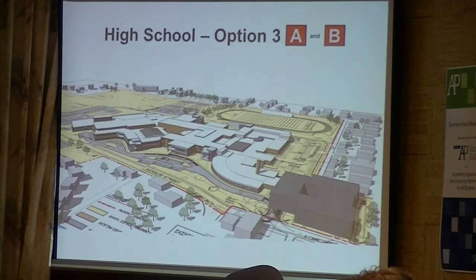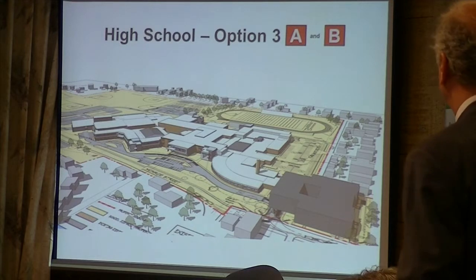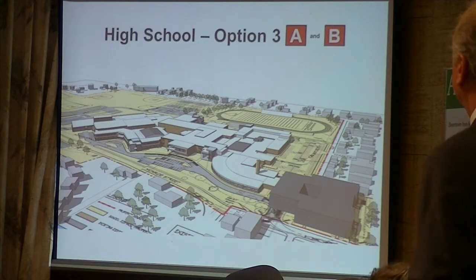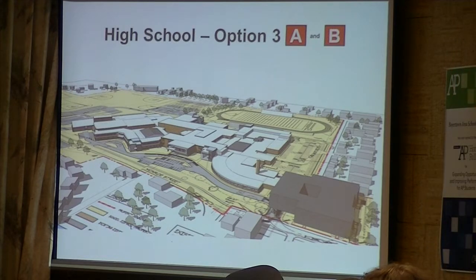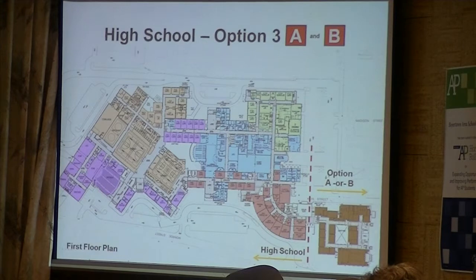I think you heard that in some of the construction manager presentations when you interviewed them, as they talked about the complexity of this project. But having that additional space available relieves the need for temporary or portable classrooms on site. So that will be used until the spring of 2016.